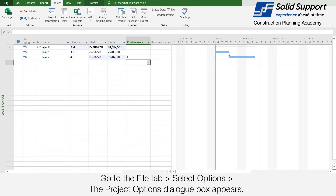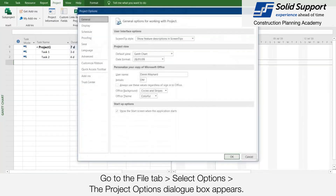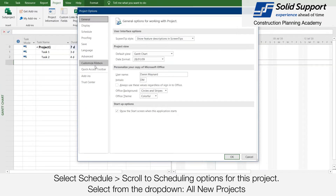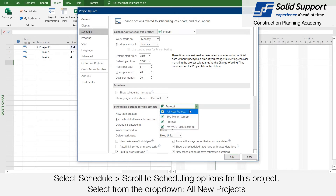Go to the File tab and select Options. The Project Options dialog box appears. Select Schedule. Scroll to Scheduling Options for this project. Select from the drop-down menu: All New Projects.